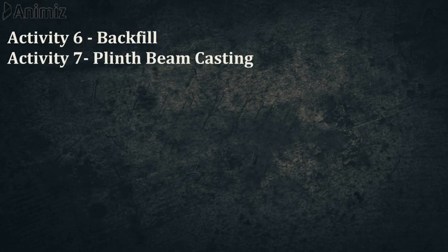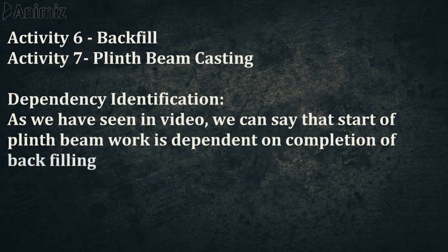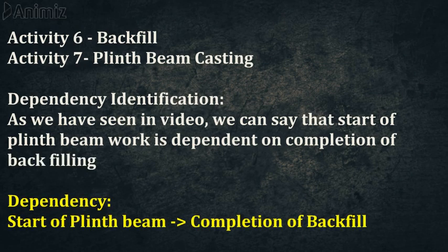Now after backfilling we do plinth beam casting. Once the entire area is backfilled, the plinth beam work can be started. As we have seen in the video, we can say the start of plinth beam work is dependent upon the completion of backfilling.